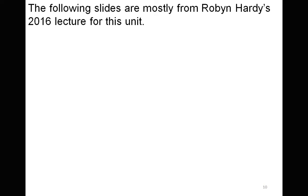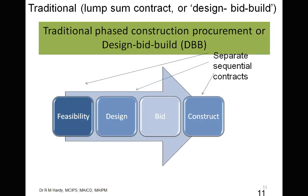Most of the following slides come from Robin Hardy's 2016 lecture for this unit. The first procurement system is the traditional method, also known as a lump sum contract or design-bid-build system. The process is: you design the project with your client until the design is acceptable, then you put it out for tender or costing — the bid part — where builders will bid on your designs through your documents. Based on that, you engage the builder to construct the project.